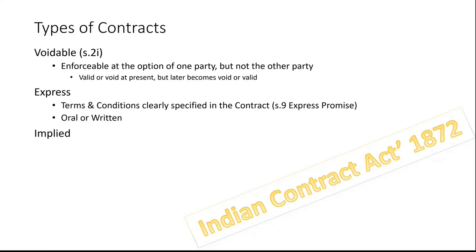Clear? Another example. You will construct the wall. What is express? You construct the wall. What is implied? Inclusive design. You say lump sum, make the wall. It should be as per this. It should be able to withstand this much tension, compression, whatever you say in civil terms. Now, what is the task of that party? Only construction. What is implied? He will do engineering. He will bring the material. You have not written it. You told me, I need a wall. So express is I need a wall.